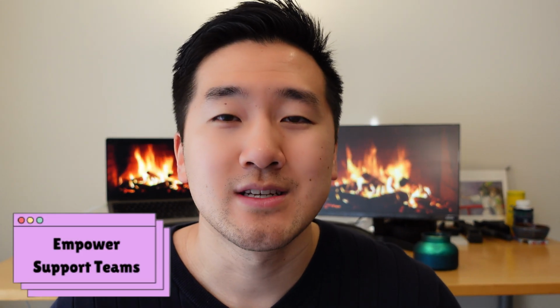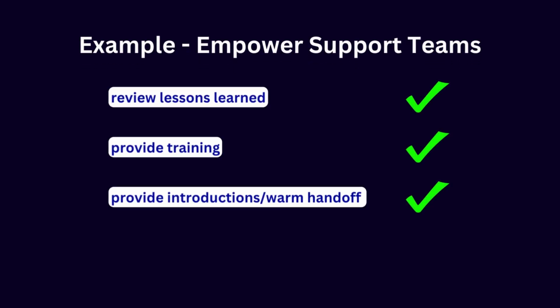In the case where there is a handoff process to another team, then you'll want to transition that support knowledge. This step typically includes reviewing any internal documentation with your support teams, going over any lessons learned, and also preparing your teams to be the client-facing counterpart, having training sessions with them, and also introducing them and starting to integrate them more into your client meetings. During the monitoring phase, you'll typically have a couple of months where you're offering more support to your client teams. It's a great opportunity to introduce your long-term support teams and to start building that client relationship with them. If there's not already a process in place in terms of what that long-term support team should be owning, definitely establish that process before you get to that handoff.